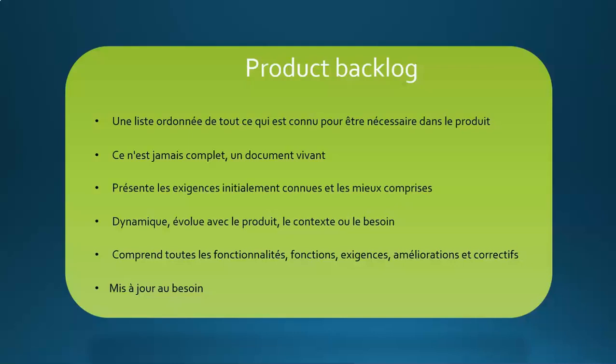This list is composed of user stories, as we have already seen. The project backlog is made before starting the project and before the first sprint. All the user stories you can think of will be recorded. Obviously, we don't predict the future, so you have to keep in mind that it's a dynamic and living document. It's not at all a static thing, so you can update it later. If an idea comes to you long after you have started, you can add it.